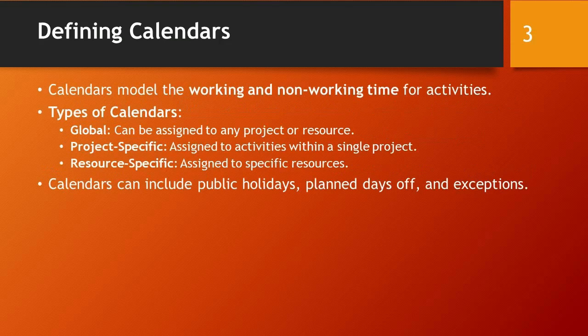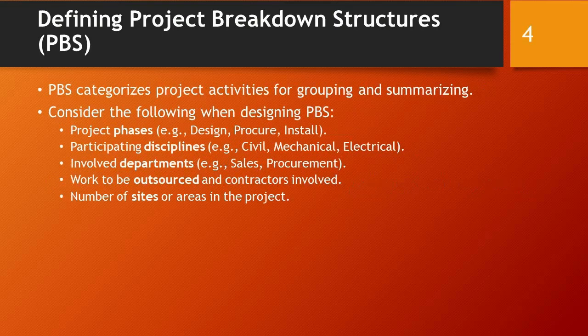Calendars model the working and non-working time for activities. There are 3 types of calendars: global, which can be assigned to any project or resource; project-specific, assigned to activities within a single project; and resource-specific, assigned to specific resources. Calendars can include public holidays, planned days off, and exceptions.